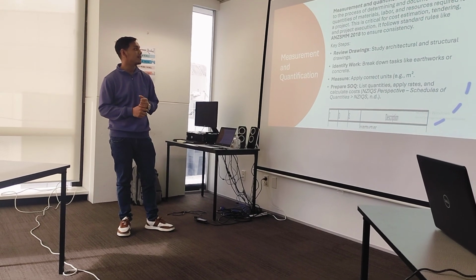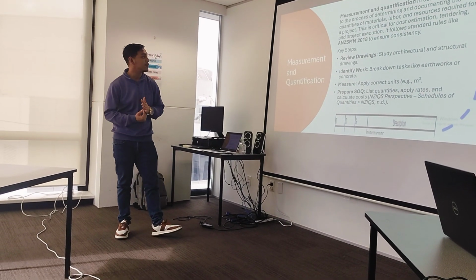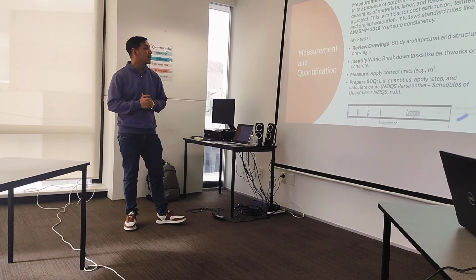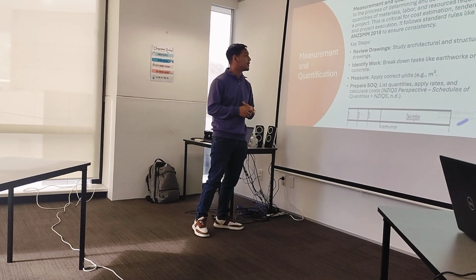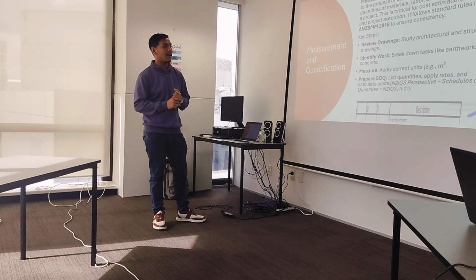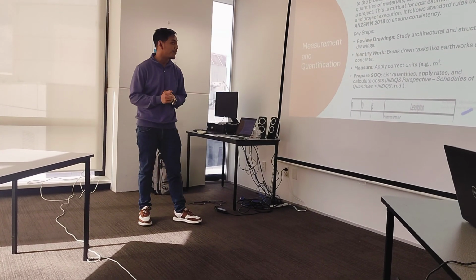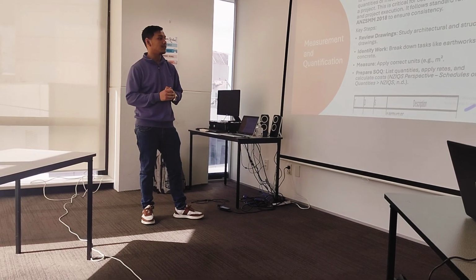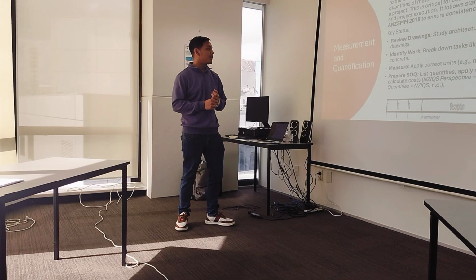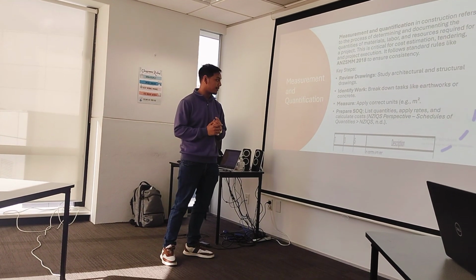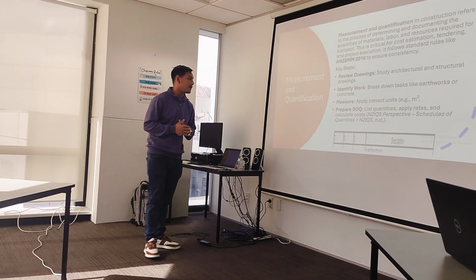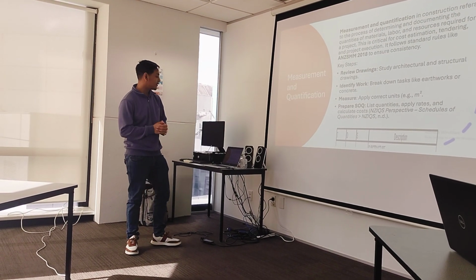To do measurement and quantification, we need to follow ANZ SMM 2018 to ensure consistency. Here are the steps. We need to understand the architectural and structural drawings. Then we need to break down tasks like earthwork, concreting, formwork, and backfilling, so that we can calculate their units. After that, we prepare the SOQ.